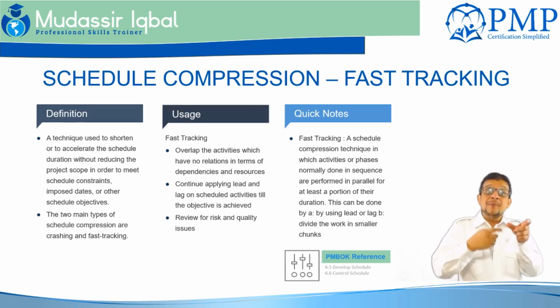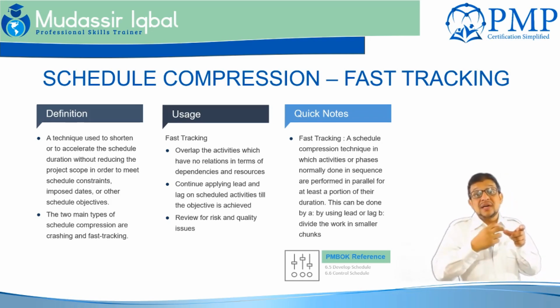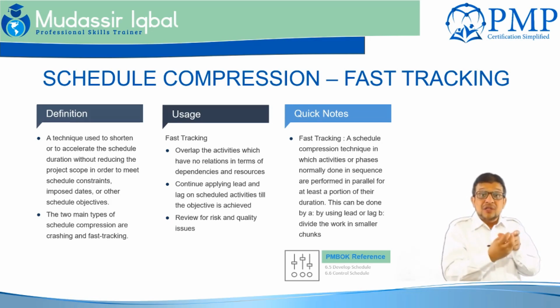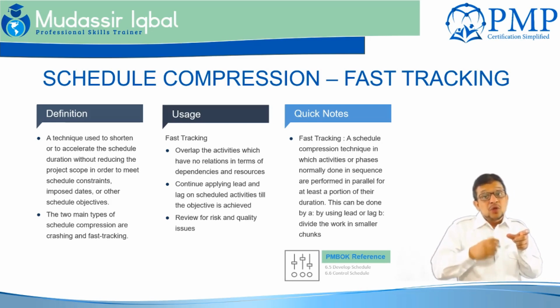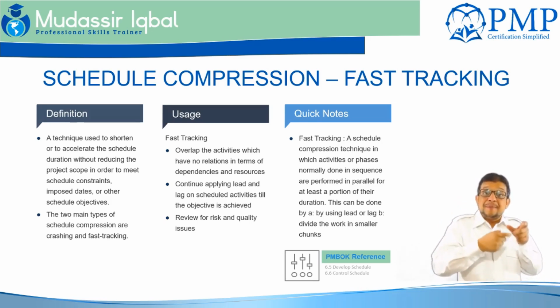Because the design is taking a lot of time and you have a good feedback mechanism in place, you are maybe 80 to 90% sure about the basic structure for the development. Instead of waiting till the design is signed off, you ask the development team to start constructing the basic structure and not the whole. So you are actually doing some tasks in parallel.